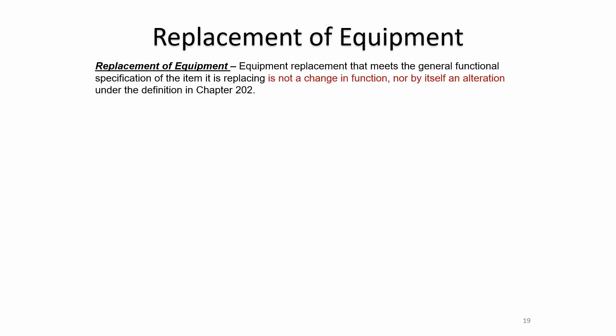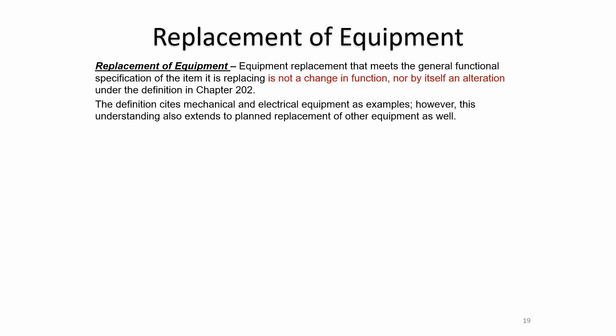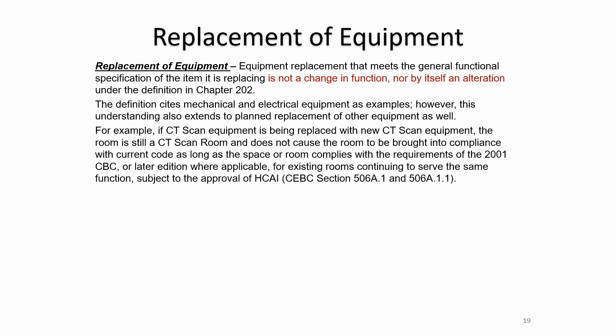When replacing equipment, equipment replacement that meets the general functional specification of the item being replaced is not a change in function, nor by itself an alteration. The definition cites mechanical and electrical equipment as examples, but this understanding extends to planned replacement of other equipment as well. For example, if a CT scanner is being replaced with a new CT scanner, the room is still a CT scan room and does not need to be brought into further compliance with current code, as long as the space complied with requirements of the 2001 CBC or later edition.